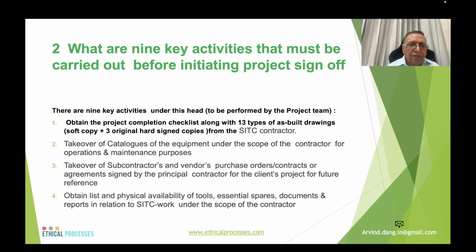2. Takeover of catalogs of the equipment under the scope of the contractor for operations and maintenance purposes. 3. Takeover of the subcontractors and vendors purchase orders, contracts, or agreements signed by the principal contractor for the client's project for future reference. These are applicable particularly when there is a large project contractor who has subsequently assigned many of these subcontracts to his subcontractors, outsourced under his scope.